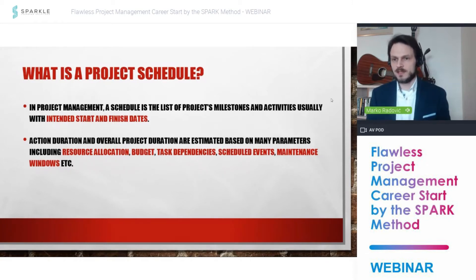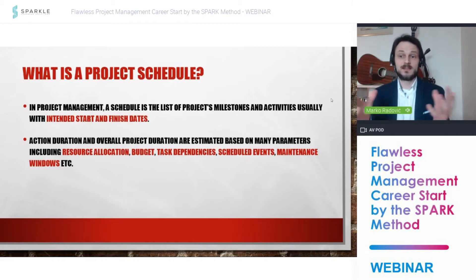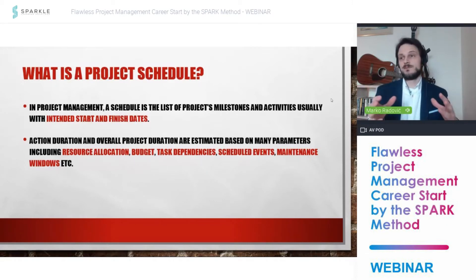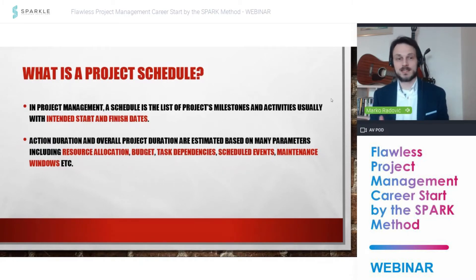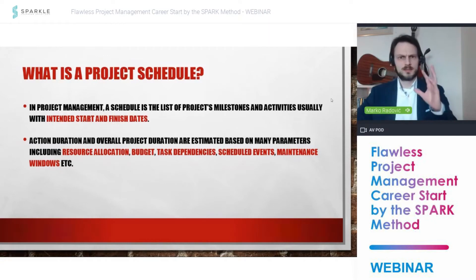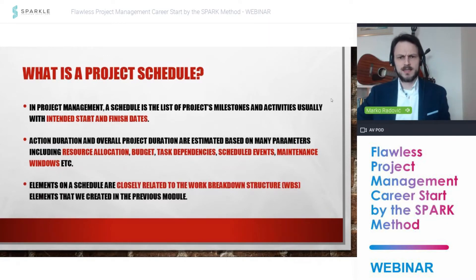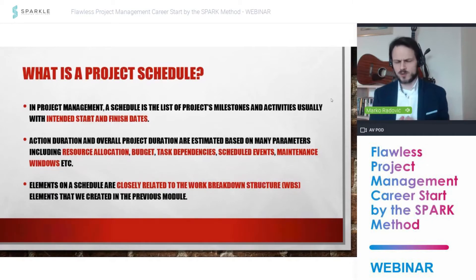We also depend on scheduled events. For example, if you need to change some infrastructure in an event venue or arena that has five scheduled events, you cannot work and switch off the power during a concert. We also have maintenance windows — a production line might say it can only be stopped on Saturday at 2 in the morning. So you need to be very careful about when things can be done. This whole area of scheduling is very wide, but it is directly tied to the work breakdown structure we covered previously.